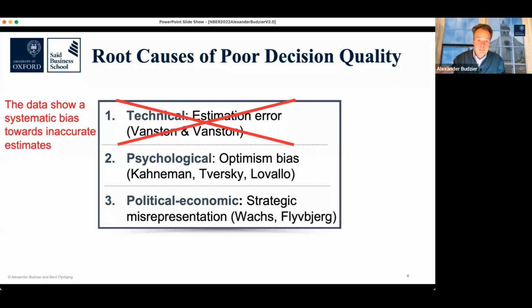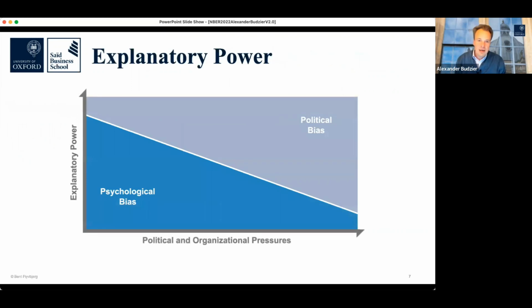the way we are procuring things, the way we are awarding work, the way we're setting budgets within government departments. That is creating incentives where we get very rational responses, where we want to underreport true cost, and we want to misrepresent or underrepresent the true uncertainty in our projects.